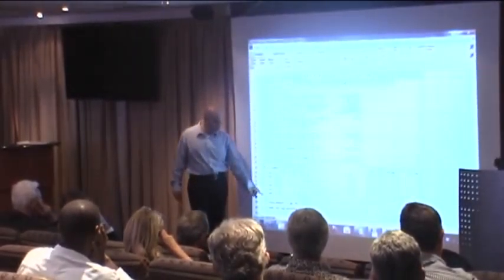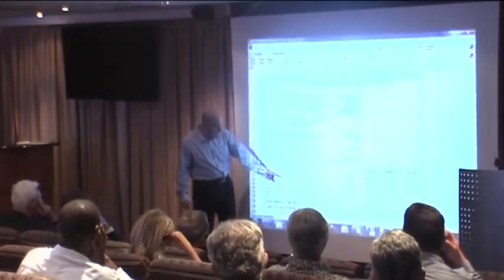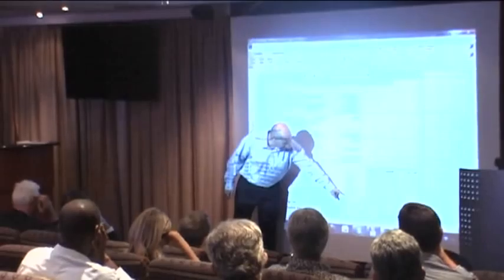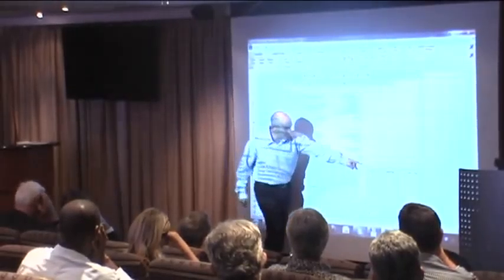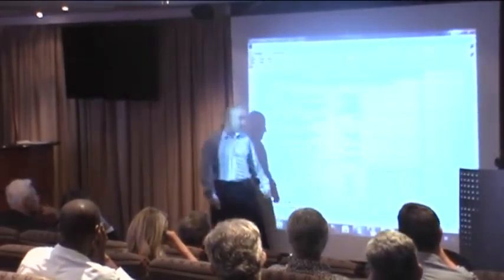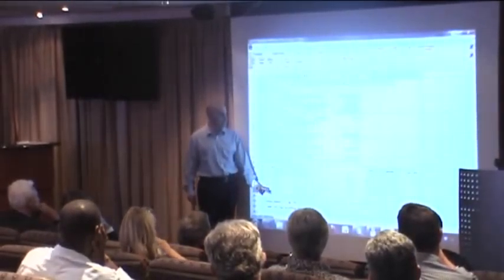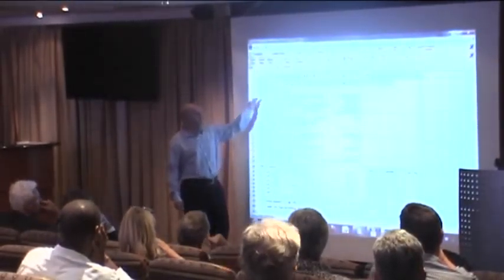6 stages across inception, concept, the normal 6 stages. Those are your default percentages. You can adjust. There is the split of that architect's fee across the 6 stages of that project. And the system is going to do the same for all of the consultants.